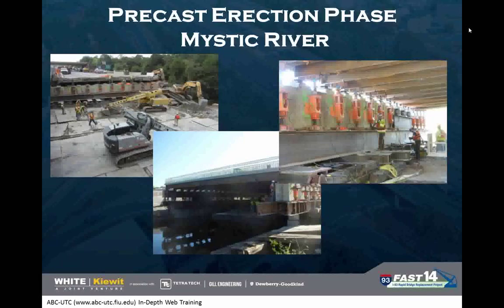So Mystic River basically spans. You've got the center span, you've got 2 back spans that span over the Mystic River. So we didn't think we could accomplish that all in one weekend. So what we decided was we were going to do it in 2 weekends. So during the first weekend we demolished the center span, and basically what we did was build the permanent center span on jacks,